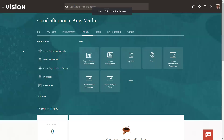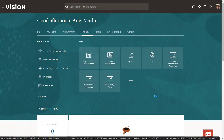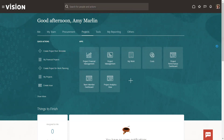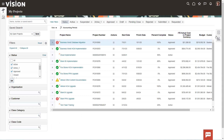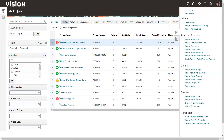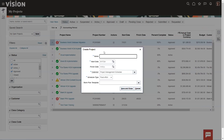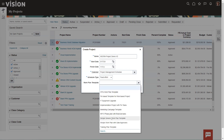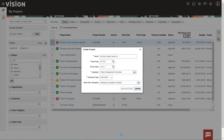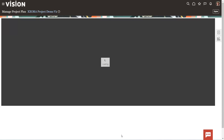Now I have logged into my Fusion application instance. I clicked on projects and clicked on project management. Now we'll select this particular task list, and in the initiate section we'll click on create project. I'll name it XX Ora Project Demo Version Two, and here I'll select a specific template like a marketing campaign template, then click on save and close. This may take a couple of minutes to create the project and load the tasks.